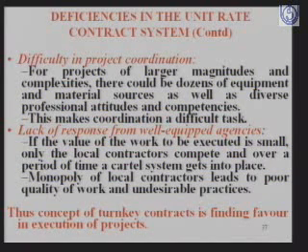Now, the lack of response from well-equipped agencies. Since this is a unit rate contract, the job is very small, because major work is done by the contracting agency, the utility itself. The work which is to be done by the outsider, on which the unit contracts are awarded, does not give sufficient incentive to take up the project, because the profit is not substantial.